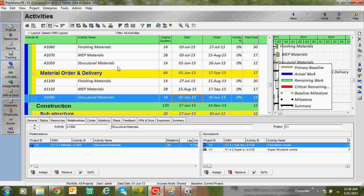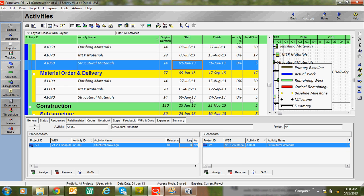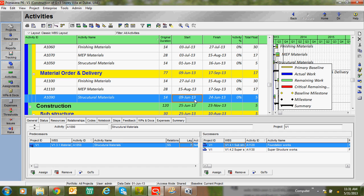Normally the logic is: the same day you are submitting the structural material shop drawings, you cannot start material submission — that's not logical. So you have to give some lag. Lag means you can push the date by two or three days, or one week. I'm giving seven days as a lag. Go to Schedule. Now we can see a different date: 1st June is the start date, but with a lag of seven days, 9th June is appearing. This is because in your calendar, Sunday may be set as a holiday, so Primavera skips Sunday and gives 9th June. You can use Start to Start with a lag to control activities this way.